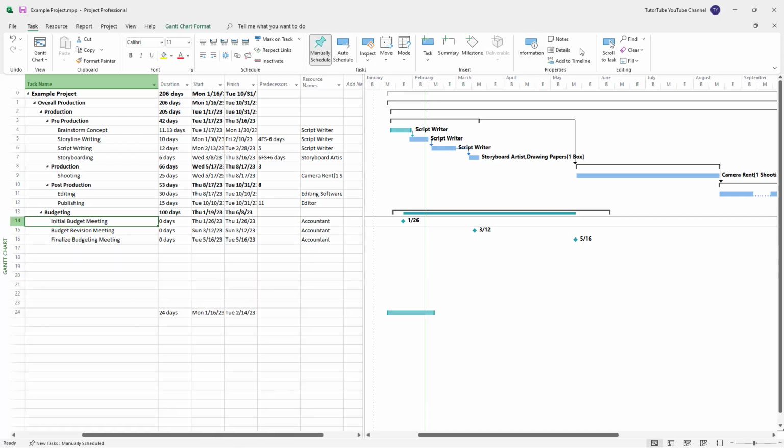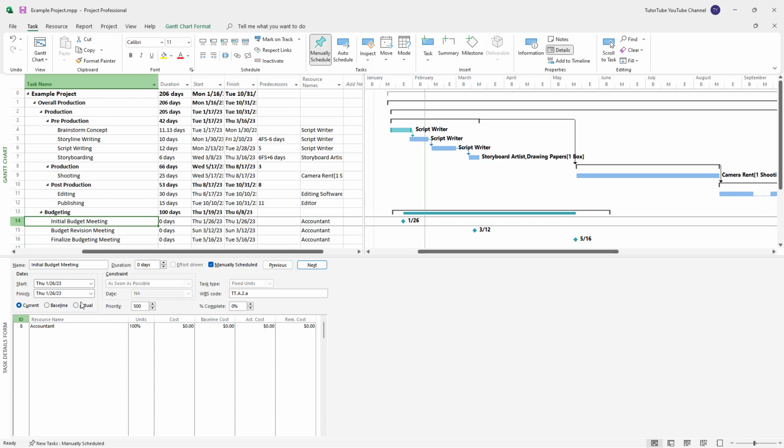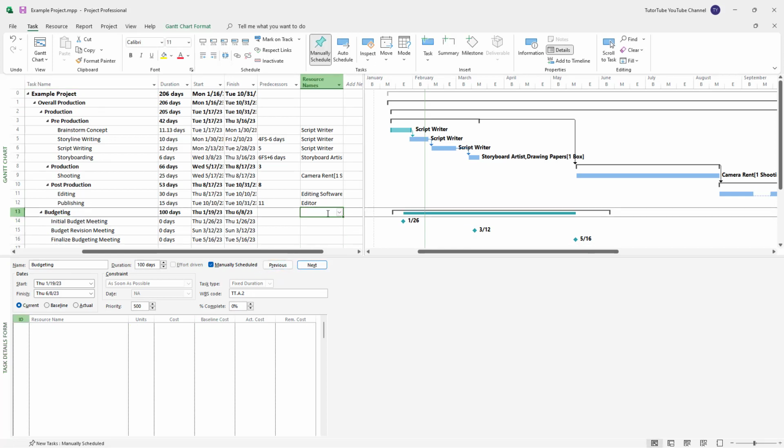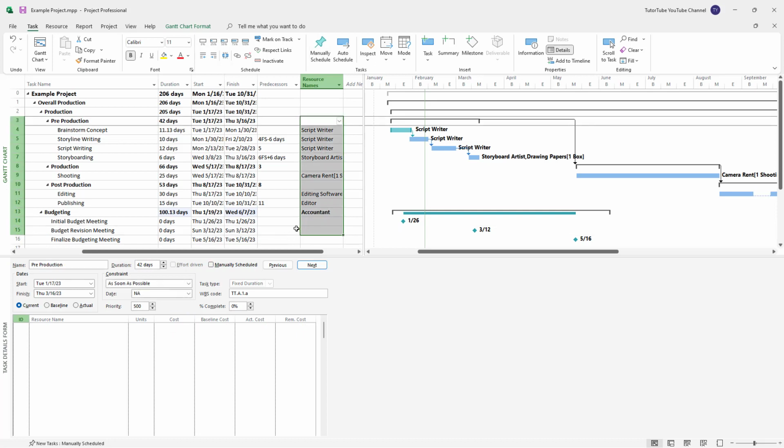Let's go to the Details pane. This is what you have. You haven't seen this yet, but you can change the cost manually as well. Initially this is milestone based, so you're not really seeing anything. So let me delete the accountant and add the accountant again. Now the days are calculated, as you can see, and you see the total cost depending on the time that is assigned. That is what you have.